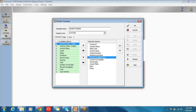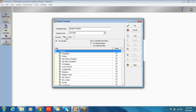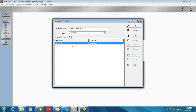I'm even putting in the percent complete type, because the way that we update an activity differs depending on whether it's physical or duration percent complete, and we're going to demonstrate both. We must have actual start and actual finish. Start and finish are optional, but for reference they tell you what the original start and finish dates were for that task. I could also consider a filter. Currently I'm showing all activities being exported, but if you're sending this spreadsheet out every month, there's probably a great number of activities that won't be started in the current update period, so you could filter them out. I also sorted the activities by activity ID to make it easier to look them up in the spreadsheet.